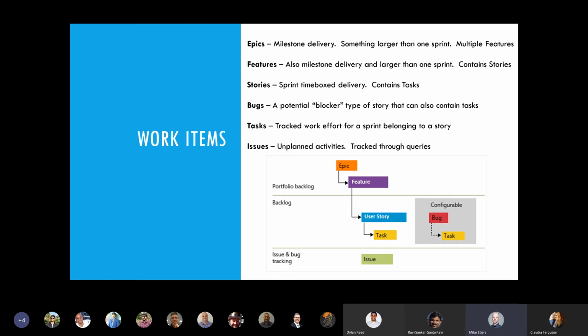And then once those stories are accepted, the tasks may not be defined, but the person who's going to be working on that story would be responsible sometimes for creating those tasks. So they take their story off the board and then they define all the things that need to be done to complete it, and there could be multiple tasks assigned to a story.